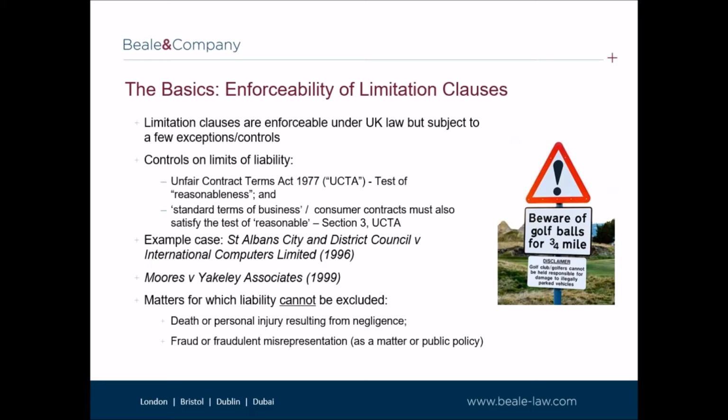As I will explain in the next slide, it is not essential that a limit of liability must match the required professional indemnity insurance, which may be a greater figure. The earlier case of Moores v. Yakeley Associates considered the effect of a monetary limitation in the REBA standard conditions and held that a limit on liability of £250,000 was reasonable despite the architect maintaining insurance of a higher level.